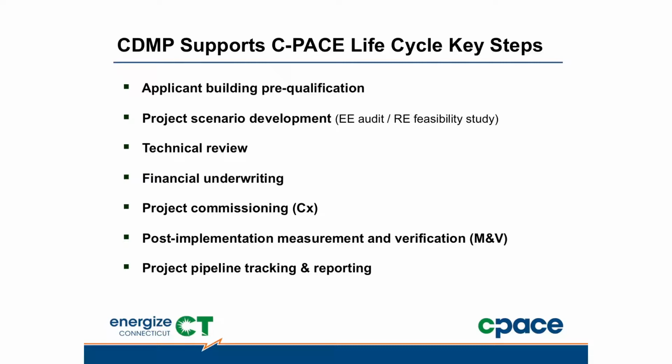Once it's approved in the technical review process, it's then submitted back to Cephia, who will complete the full financial underwriting. At that juncture, Cephia is going to collect all the building owner and property financial information, tax returns and the like, and put it through its final financial underwriting, get the commitment for the owner, prepare the financing agreement, and go to closing. Genevieve's going to give a little more flavor around that in her remarks this afternoon. At that point, the project will be scheduled for installation and commissioning.